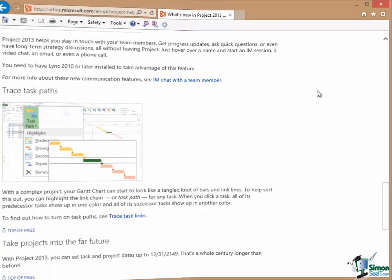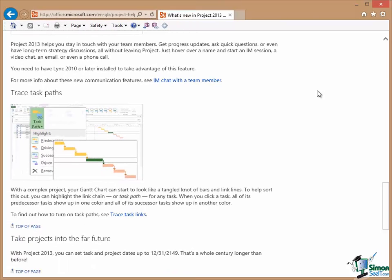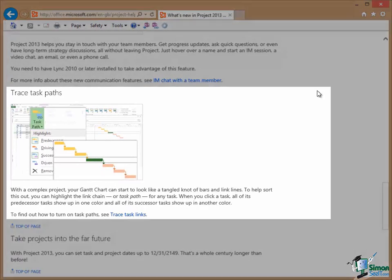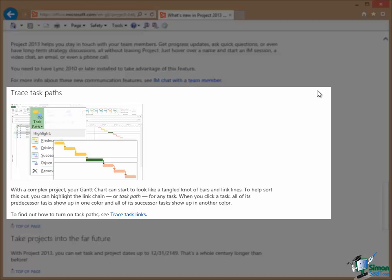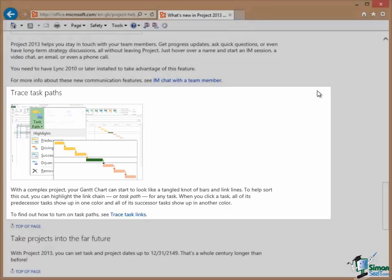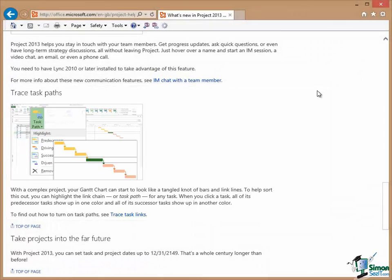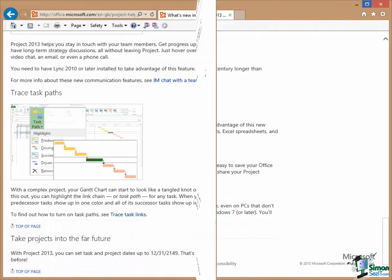If you're dealing with a complex project and you're having trouble sorting out some issues with a specific task or around the area of a specific task, you can look at the task path for the selected task which shows all of the predecessor tasks and all of the successor tasks conveniently colored to help to identify them.